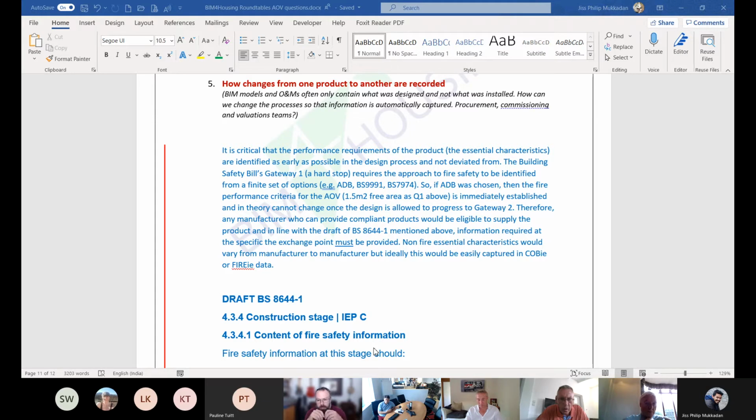At the moment, this is something coming. I'm part of an emerging team where these are the things that are now being put forward, and we are now tightening up and trying to introduce those stop points where we have the opportunity to be made aware or to question if things have been changed, and have the right to refuse if we know and understand what the implications of the changes are. So we're not there yet, but we know that it's something we need to be working towards.